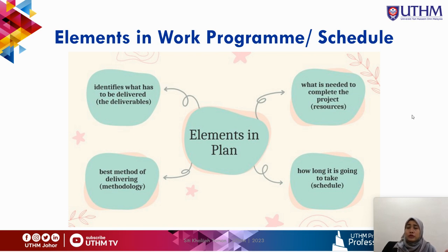So you have to know in detail what is going to happen, what is required for that particular method, and how long it is going to take to complete those activities. And then what is needed to complete the project: the resources in terms of time, material, people, machinery, and so on. You have to identify this as early as possible before the project starts, because you have to plan everything. For example, for the material, you need to know the best time, the suitable time, to deliver, let's say, brickwork to site.